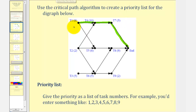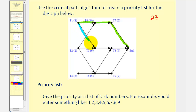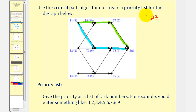If this is a critical path, there's no path that would take longer than twenty-three hours. Notice how if we start at task one again and go from task one to five to eight to the end, the total time would be eight plus six plus nine, which is also twenty-three hours. So if this ends up being the longest time, these would both be critical paths.